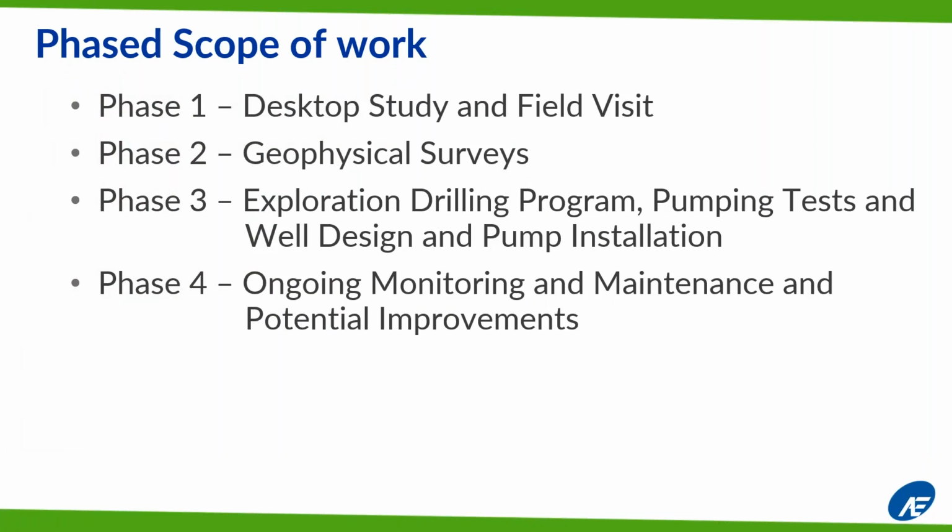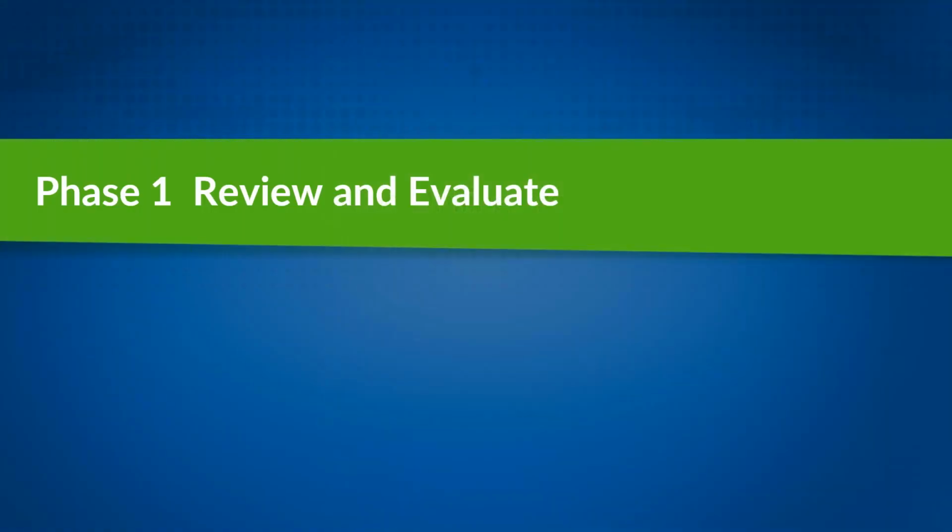Associated scope of work: after understanding the background, we did a desktop study and a field visit. The second phase was a couple of geophysical surveys. The third was a drilling program, which involved installing pumps and doing pump testing, completing a final well design and pump installation. And then phase 4 was a monitoring system so we can monitor groundwater levels over time. We'll just start with phase 1.